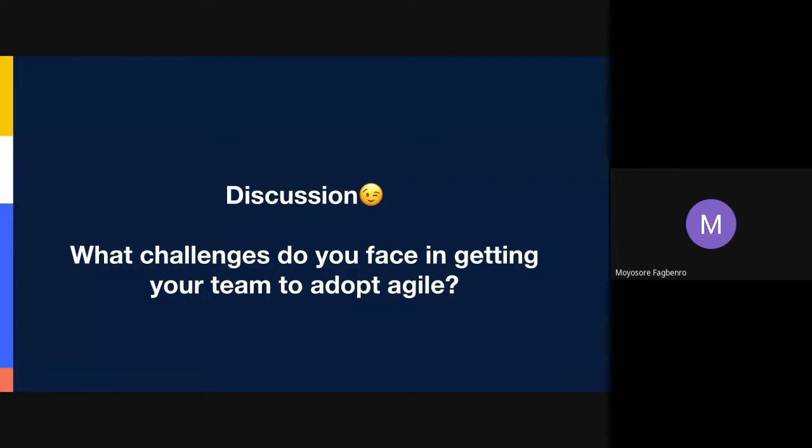Another thing you can do, because this is what I'm also currently doing at my place, is keeping an allocation for bugs. So if I see that my sprint velocity can't handle more than 20 sprint points per sprint, I make sure we don't take up the entire 20 sprint points. So maybe leave an allocation of 4 sprint points in case a bug comes up, because you also have to think about it that besides bugs coming from outside, while you're developing a feature or working on whatever it is you're doing for that sprint, bugs can also occur and they might need some more time in order to tackle or resolve those bugs.